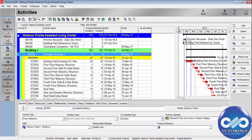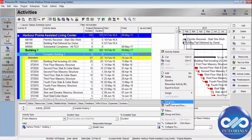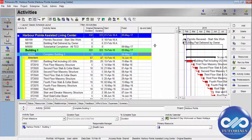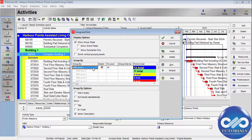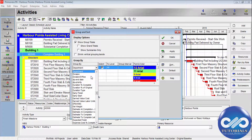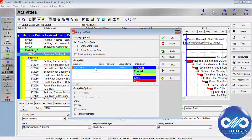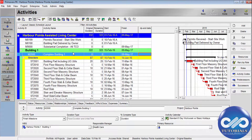Even in activity steps, activity resource assignments, projects, resources, WBS, and project expenses — wherever you want in the view window, you can right-click and select Columns to add user-defined fields as per your requirement. You can also group and sort based on user-defined fields: click the View button, go to Group and Sort, and select DPEnded to group and sort based on this user-defined field.